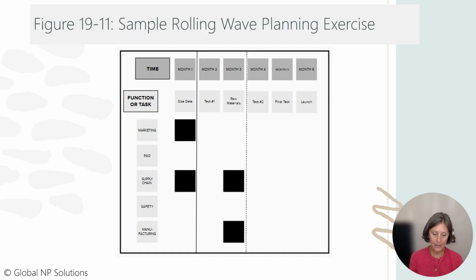Rolling wave planning. Much of the waste in waterfall project management occurs because detailed plans are created for the entire project lifecycle upfront. With new product development work, initially there are a lot of unknowns. When more information is gathered, the previously determined plans must be reworked. Rework is a fundamental waste in a lean system. Scheduling in lean new product development uses rolling wave planning.